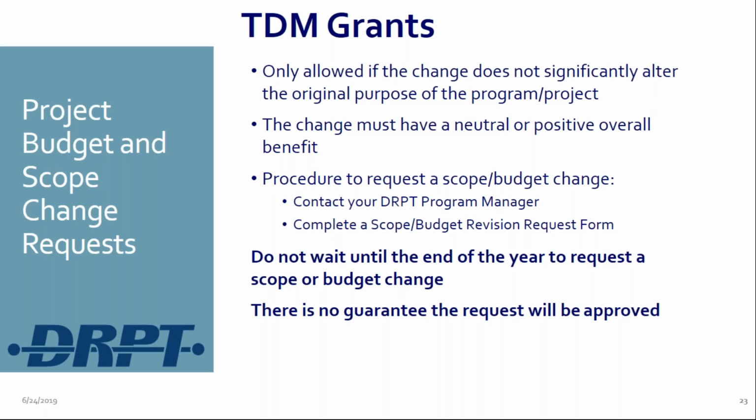Now, the one thing is, if you add to something, you're taking away from something. So that's what I'll want to know. Okay, so it's a budget change, not of the total budget of your project, but of one item. Of one item, taking from another item potentially. Exactly. We can't mid-project say, hey, DRPT, you got an extra $20,000? No, you're still working with the same pot of money, and what was approved initially.